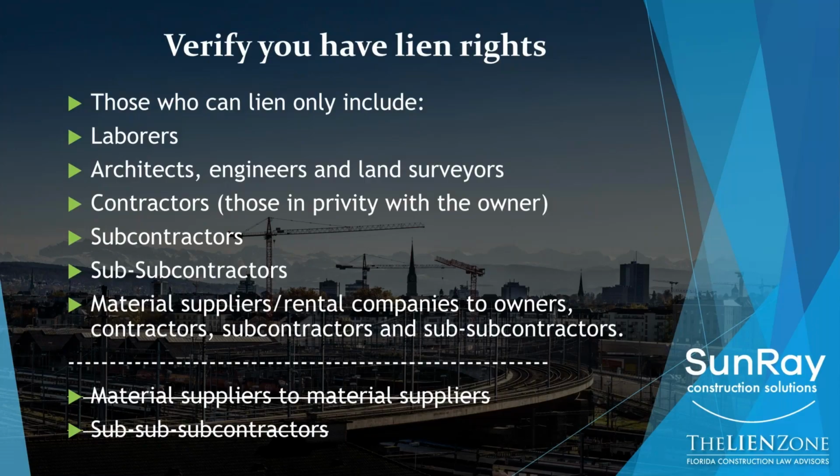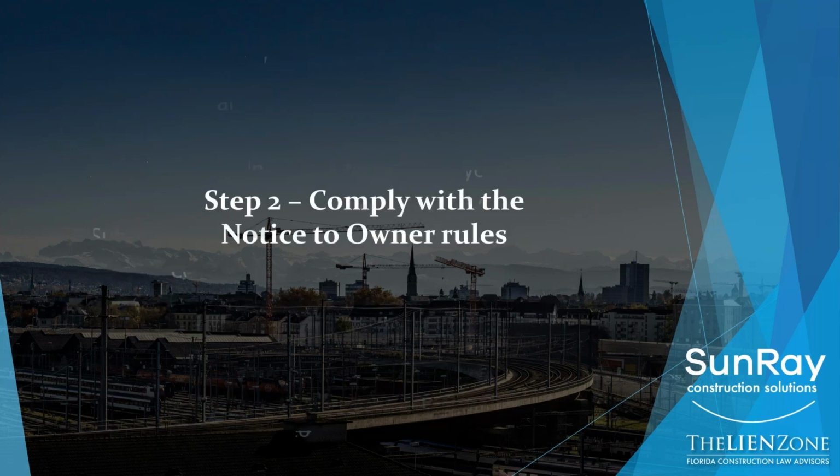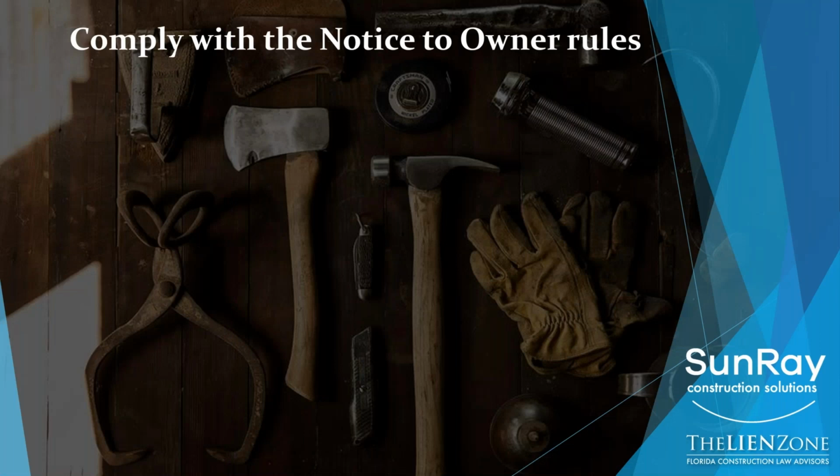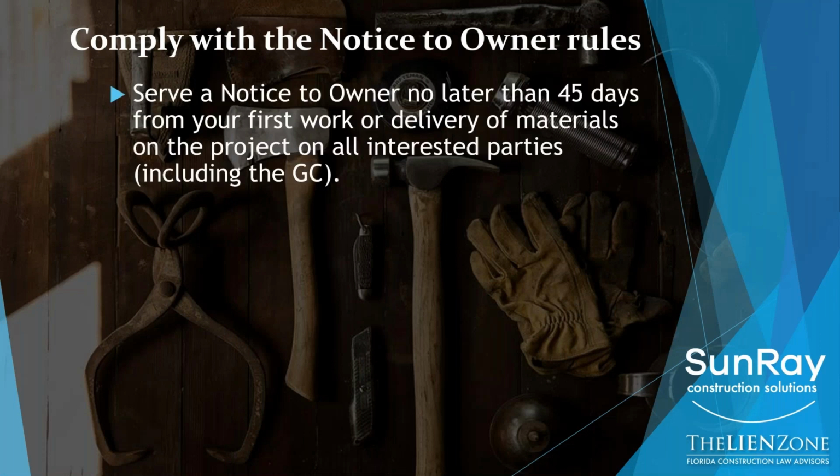So once we verify that you have lien rights, what's the next step? The next step is to comply with the notice to owner rules. So many of you are probably familiar with these rules, but it never hurts to go over them again. People always learn something a little new. You need to comply with the notice to owner requirements. So that means you need to serve a notice to owner no later than 45 days from your first work or delivery of materials on the project to all interested parties. That includes the general contractor.